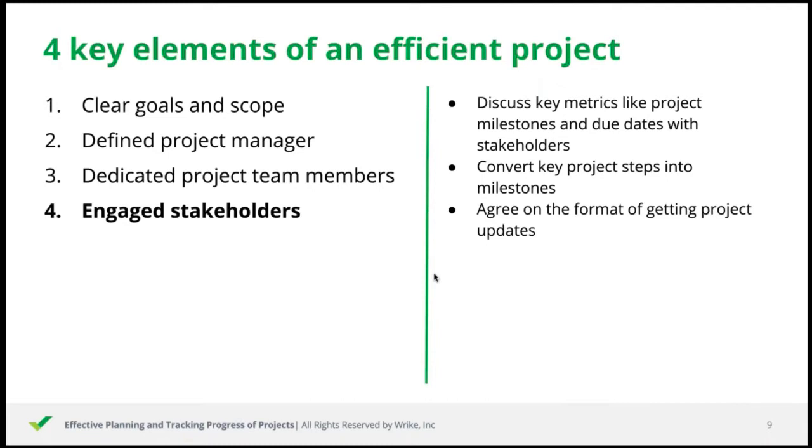Stakeholders could either look at the items that are of interest to them directly or open a report. If the stakeholders don't want to register in Wrike, they can use external capabilities like Gantt chart snapshots, report snapshots, or public link to the calendar. Please note that the first two solutions only provide a static picture of what's going on. So in order to receive regular updates, you would need to constantly create updated snapshots and send new links to the stakeholders. You can create a recurrent task for yourself that will serve as a reminder for that.